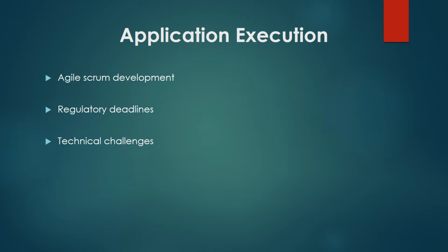Sovos uses agile methodology, particularly the flavor of Scrum. So they have Scrum masters and do 2 week sprints. There's a 2 week sprint at the beginning of the month, and then a 2 week sprint at the end of the month, and then the code that was done that month gets released the following month. So there are 2 August sprints, and then that code that's developed gets released in September.